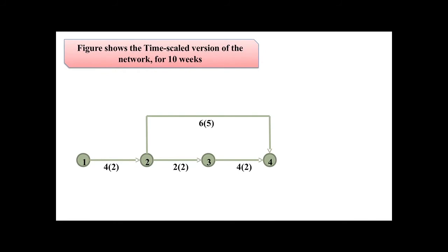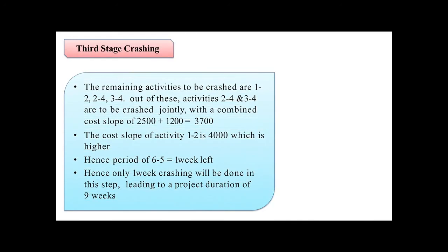Now, this figure shows you clearly that 2-3 cannot be crashed further. So this is our minimum time in which we can complete the project, because if you crash any other activities, it will affect your project duration. So it will require 10 weeks to complete this particular project.